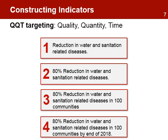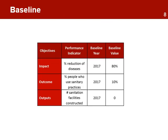This is a simple process that can be used to guide the development of good indicators. The baseline is the value of the indicator taken before the start of the project. These values act as reference points against which progress of the project can be measured. The information on baseline can include the date the baseline values were obtained, and this will help determine the performance of the project over time.